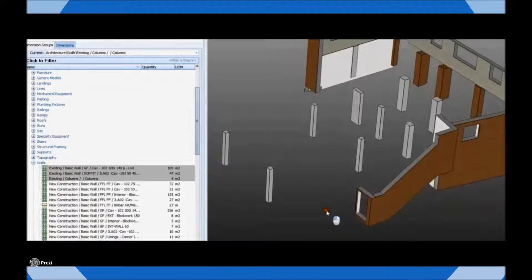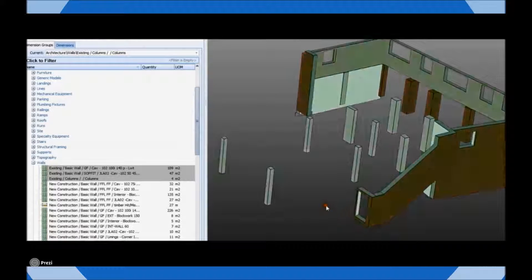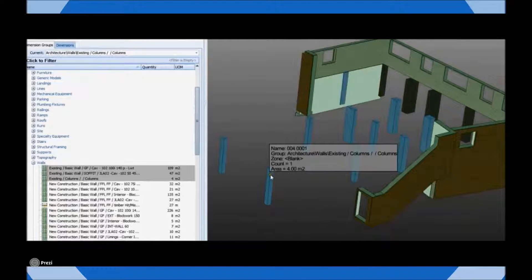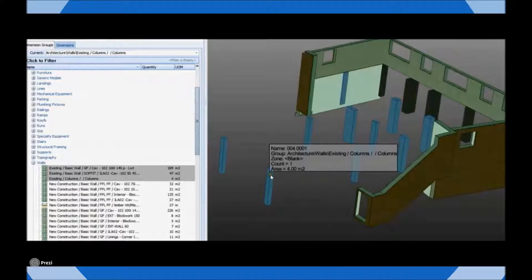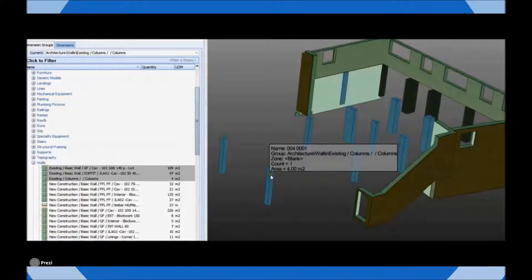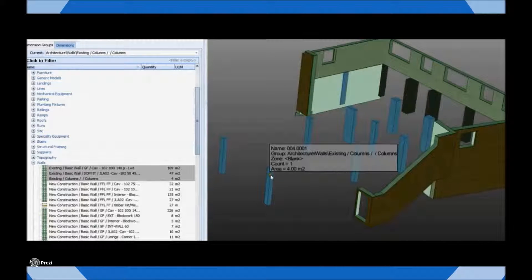Whilst this has no implication for the design of the model itself, it will affect the development of the project's cost plan where any attempt to automatically take off the quantities will assign these items to the wrong section, possibly leading to incorrect cost information being allocated.